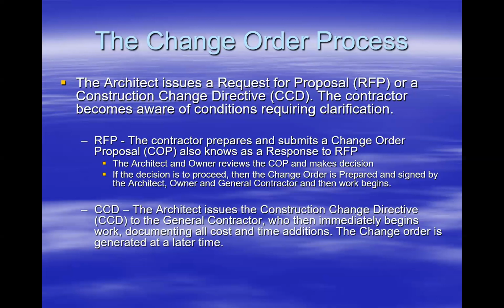So they don't want to start this without having some type of solid idea of what this is going to cost. And so at this point, they may actually issue a request for proposal for the contractor to give them a proposal to add that wing.